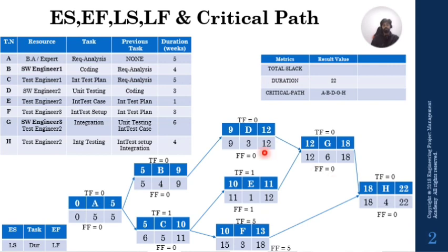But if you're not able to identify any engineer during this time frame, and you're totally blank about it and there are no resources coming from outside the project, then you can go ahead and communicate to your stakeholder and client and see how important it is for him or her that this project be completed on time, and what is the freedom that you have. Alternately, in the upcoming videos we're going to discuss resource leveling and resource smoothing, and you can apply those concepts here.